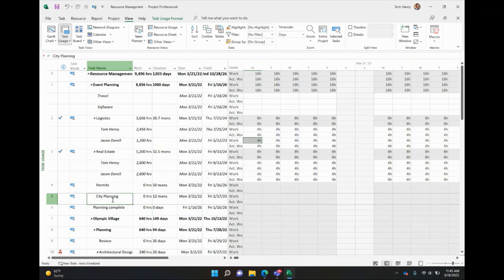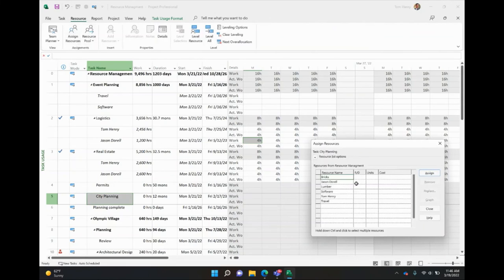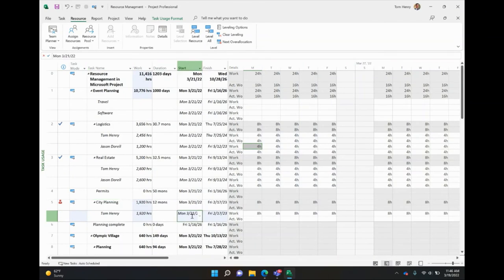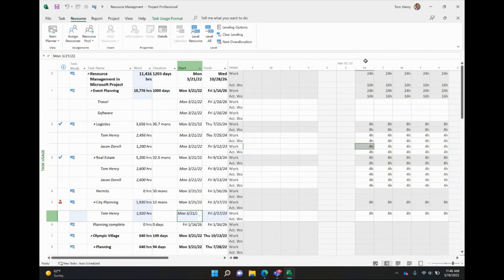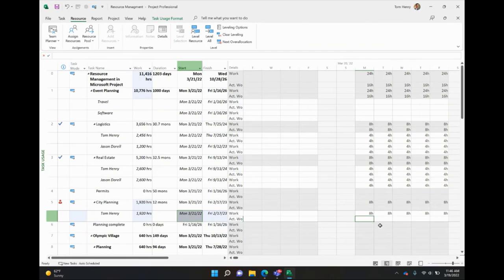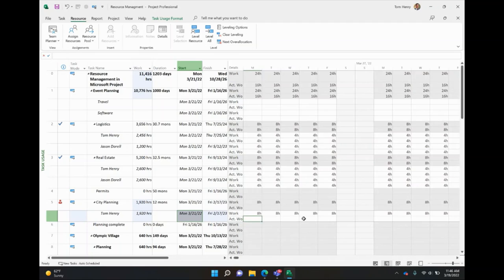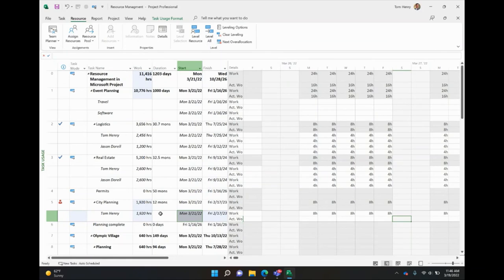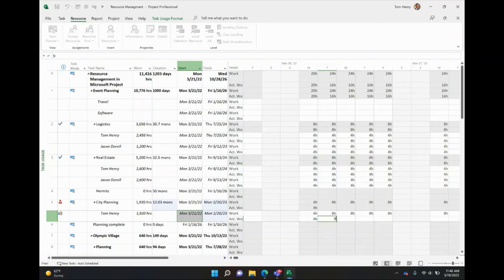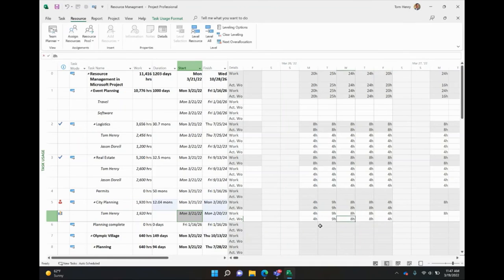So let's take this, make this really simple. I'm going to take a new task here, city planning, I'm going to assign a resource, because I want to do this in here, I'm going to click on the assigned resources, I'll assign Tom Henry. Boom, straight away, we can see based on the start date, 321, the work forecasted, 321, if we hover over this date here. There we go, March 20. And then obviously, this is the 21st. We can come in here and actually mark the real hours worked. And you could do this each week for your project. You should come in and here's your week blocks, Monday through Friday, you can change the calendars. If you want people to work Saturdays, if they do work a Saturday, you can come and put that in. Let's take a look at that. So this is really granular. Now, you might want it, you might not. So for Tom, Monday, he said he only worked four hours, then on Tuesday, he actually worked nine, there's a bit of overtime there. On Wednesday, he worked eight hours, Thursday, eight hours, Friday, got tired, and only worked four. So you can see how granular we can be with this.